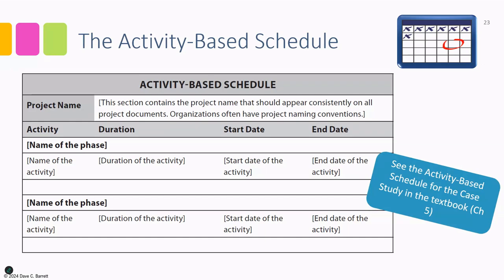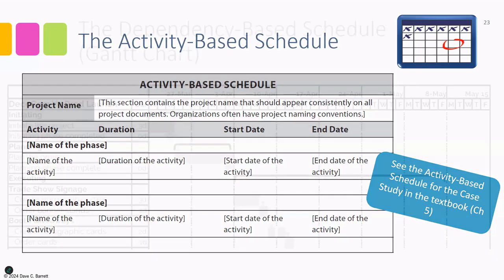Its advantage is that it has more detail than the milestone-based schedule. There is timing information. It's also very accessible and simple to use. Stakeholders can easily access this. The key downside is that it doesn't contain the dependency information. You can't see which activities are dependent upon other activities. It is a highly used type of schedule, generally for medium-sized projects that are big enough but not overwhelmingly large. So sort of in that medium range is when you'll see these.